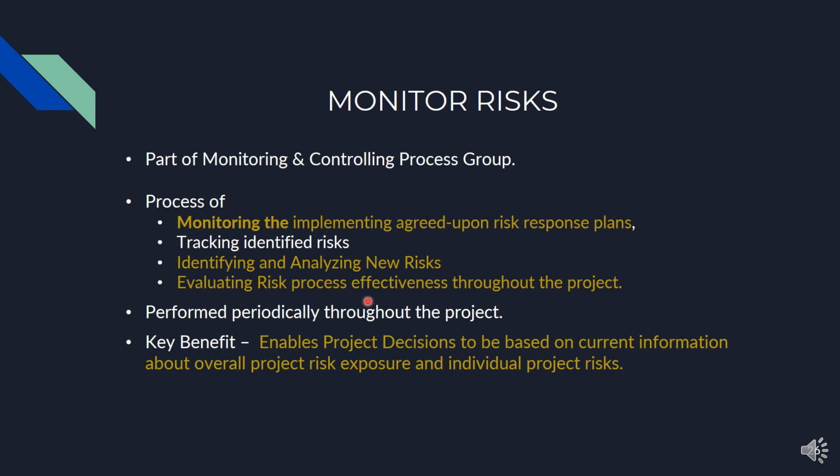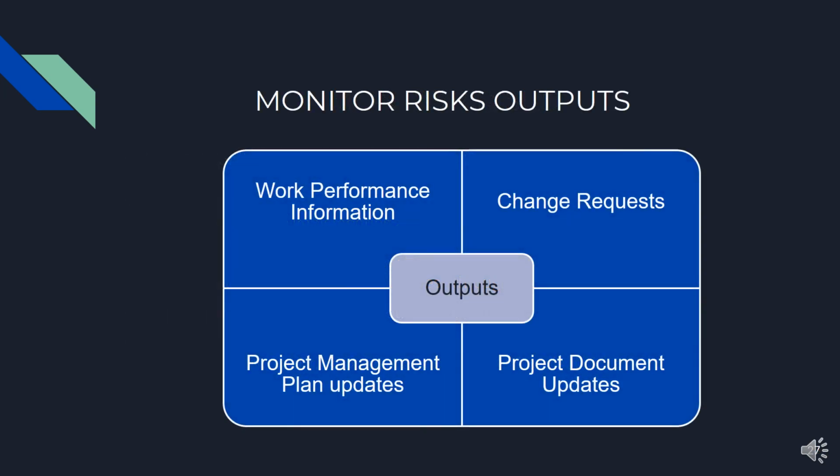Key benefits are it enables project decisions which are based on the current information about overall project risk exposure and individual project risk. So outputs for the monitor risk process are work performance information, change request, project management plan updates, and project document updates.